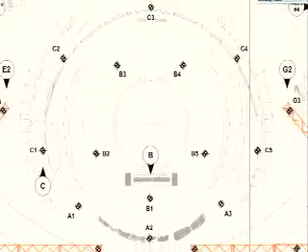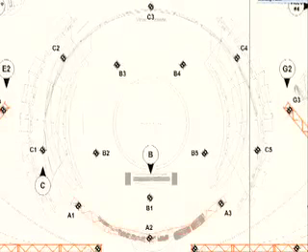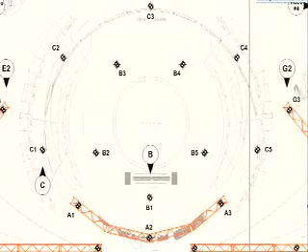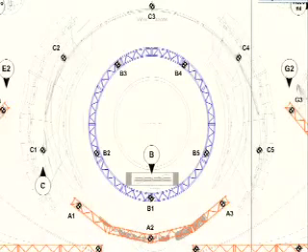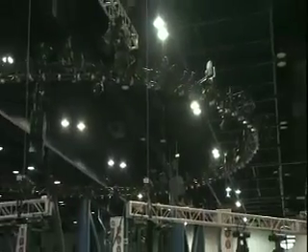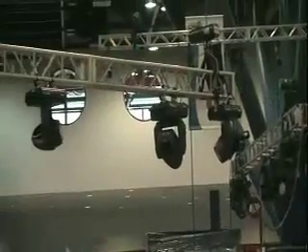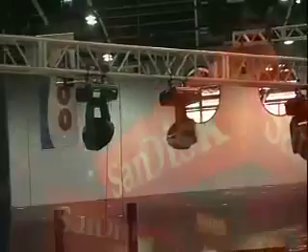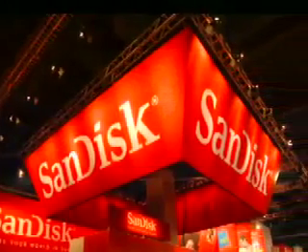The lighting design begins with the creation of the truss plan or hardware layout required to support the lighting fixtures used. This plan is usually designed using a computer-assisted drafting or CAD program as an overlay to the layout you've already provided. Oftentimes, the design of the truss is utilized to not only support the lighting fixtures where they are needed, but also to aid in the support of hanging exhibit properties or signage as well.